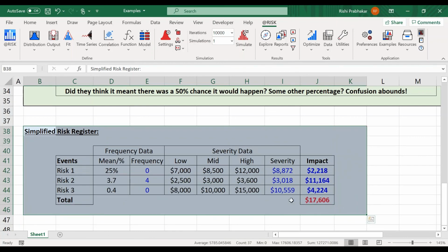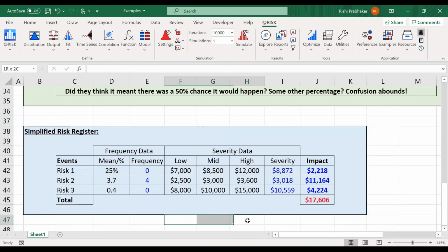But I could of course have one column per time period and have the next 10 years and have 10 compounds for each line item representing their impact across each of those years. And then I would get yearly sum cost information as well. But that's a choice you make about the structure of the underlying model.